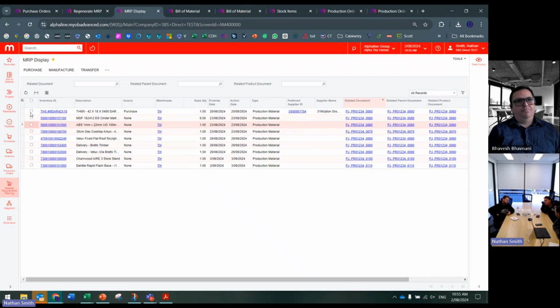How do they invoice for a third of the goods when our accounts won't pay the PO unless it's complete? They might pay a partial PO, but we need a one-for-one correlation. If it's going to be delivered on a particular date, we need that purchase order to be specific to that order, that delivery.